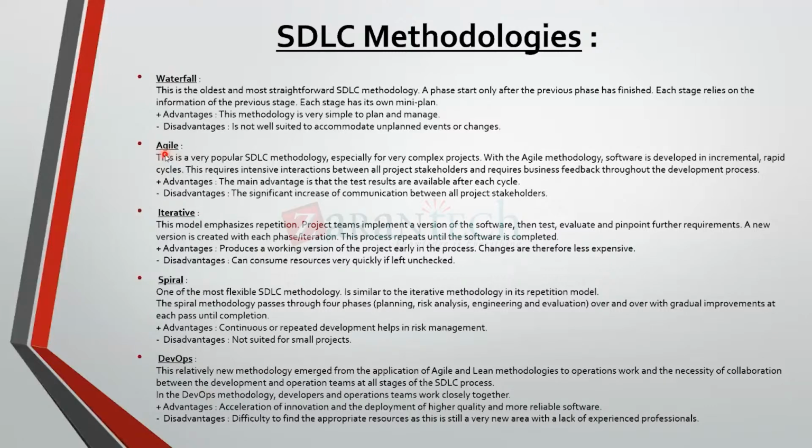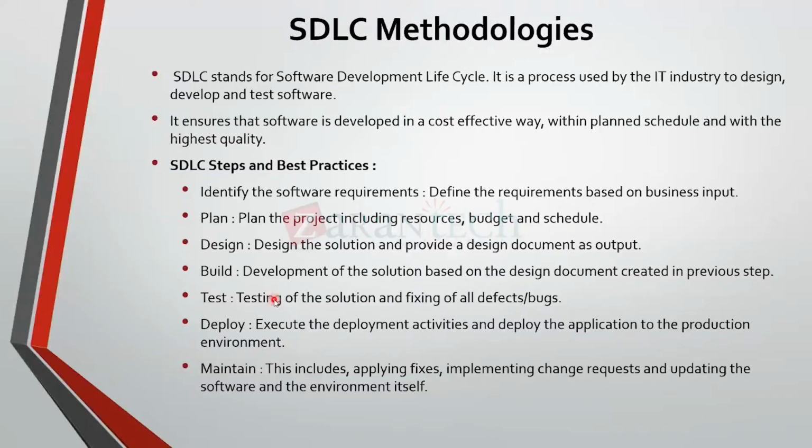No, the processes are done together. If you go back to the example, in build, test, and deploy, you're doing the complete build together, then testing completely, and then deployment. In agile, you are building a small thing, testing that thing, and then deploying. Then again, you start building, you test it out, and then deploy.